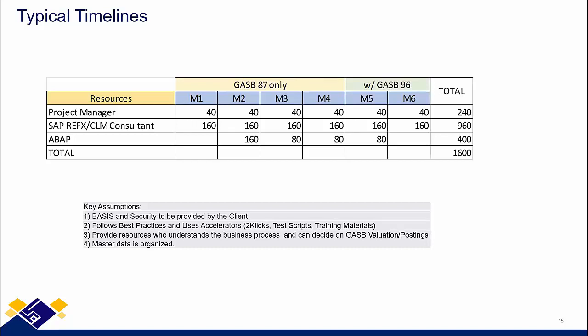As far as resources are concerned, we have a project manager who will be on a part-time basis, but the REFX consultant will be full-time beginning to end. Also, we have an ABAPer, just in case you have some special requirements on reports and integration and some enhancements. The key assumptions for this type of project is that basis and security will be provided by you, okay? And you will follow the best practices and use our accelerators: the 2 clicks, our test scripts and training materials that we've collected over these years. Hope you can use those as well to expedite this project.